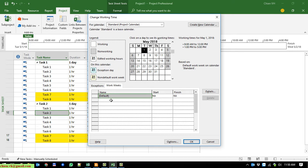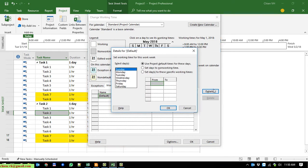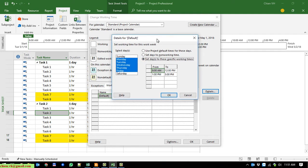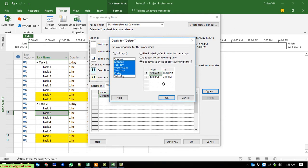It will display the default name and the start and finish dates of this project. Keep it as default and click on the Details button on the right side. Here you can see the 'Set working time for this work week' panel. On the left you can select days. The current schedule shows 8 to 12 (that's 4 hours) in the morning and 1 to 5 (another 4 hours) in the afternoon — totalling 8 hours per day for the selected days.